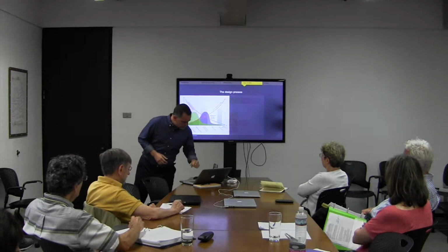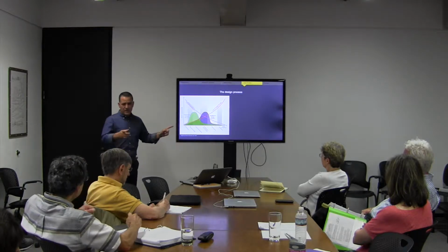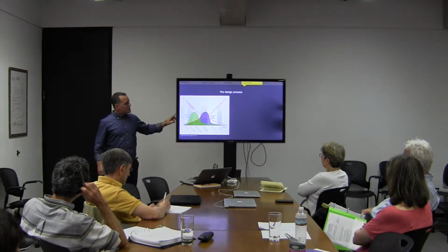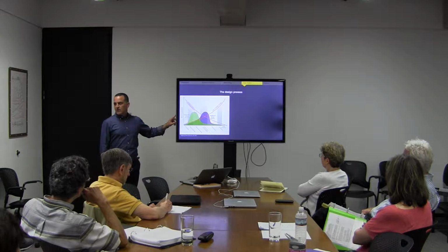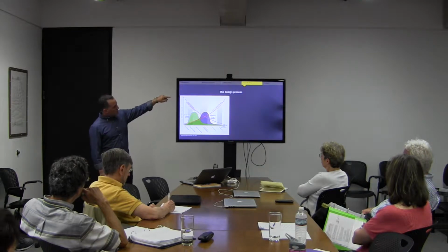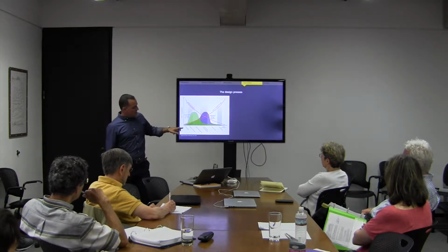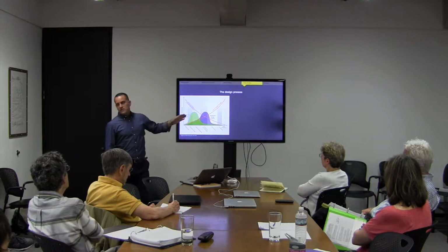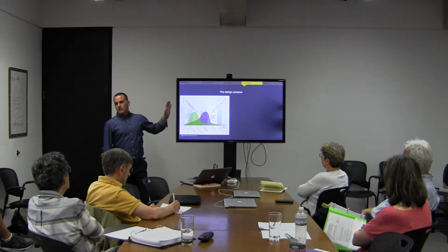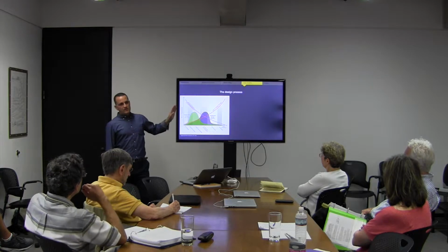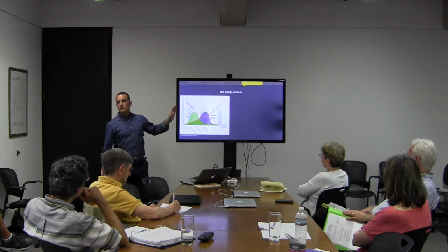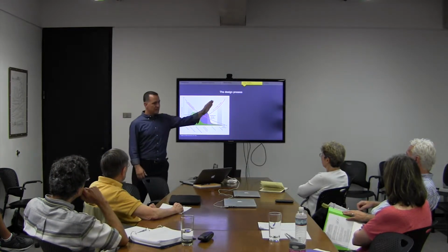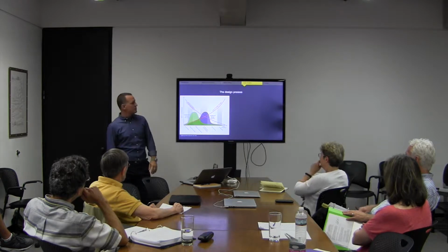I wanted to introduce also, or to remind you, because it's in the dissertation, this curve, referred to as the McLeamy curve. Patrick McLeamy from HOK introduced this in the 80s. We all know that the further we get in the project over time, the harder it is to influence the nature of the project, and the cost, of course, of any changes will be higher as well.